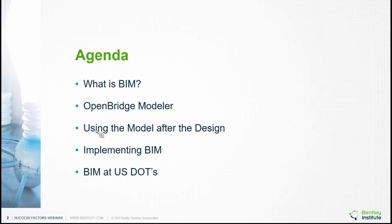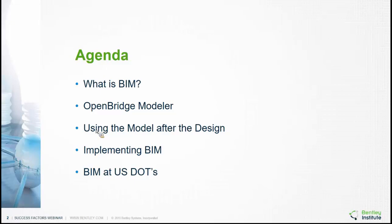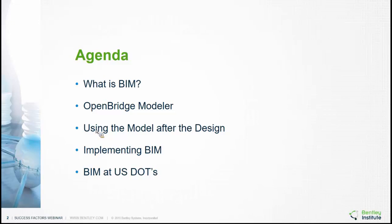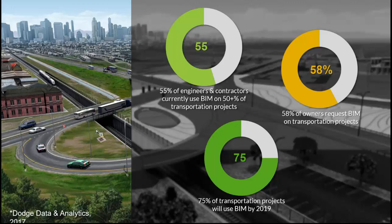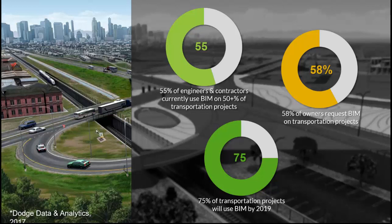We're going to review how this BIM concept or approach is being tackled by different DOTs. BIM is here to stay — we cannot avoid it. We have to do 3D modeling because the industry requires that. The old times of plan, profile, and cross-section sheets are basically going away. We're pushing for 3D models in which efficiency and the cost of the project will get reduced. According to Dodge Data Analytics, 70% of transportation projects will use BIM by 2019.